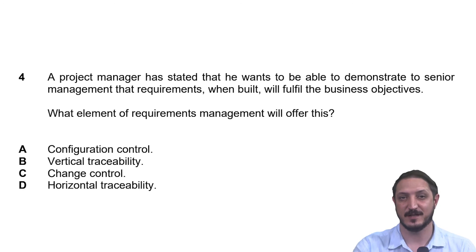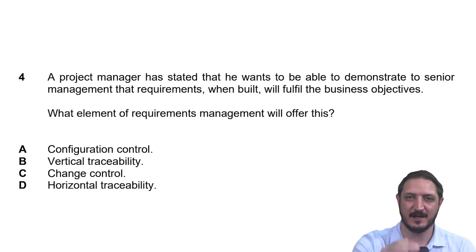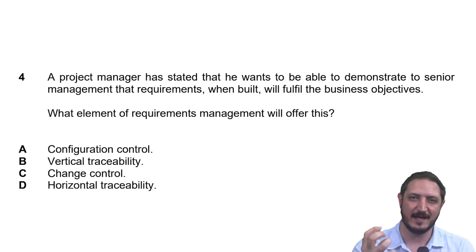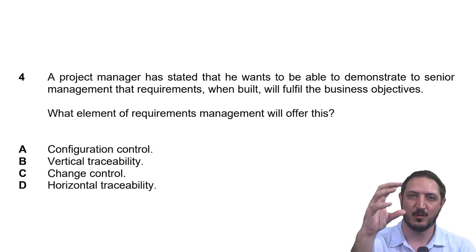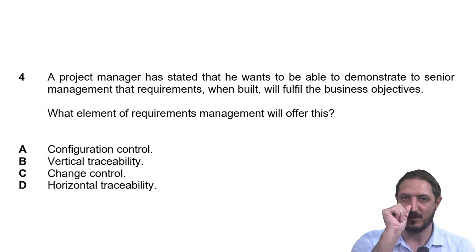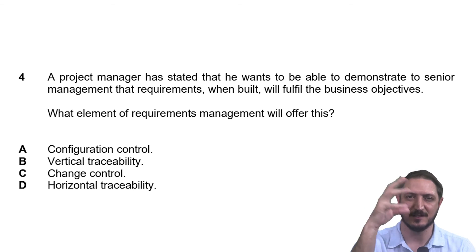Then we also have vertical traceability, which is a slightly different concept. This is more along the lines of looking at requirements up and down the hierarchy of requirements. We have the defined specifications at the bottom — the specific requirements for the system that have been analyzed and defined clearly, ready to be built. We then need to look back through the broader, more general requirements all the way up to the strategy, business objectives, and policies at the top.